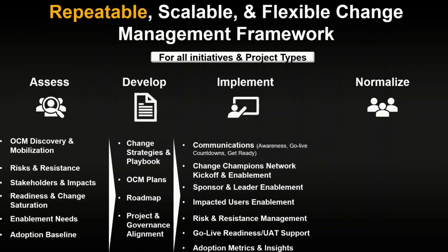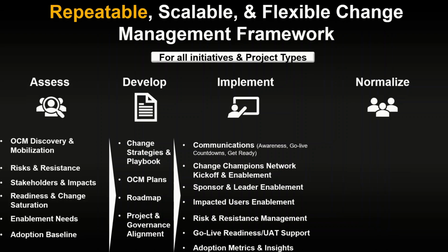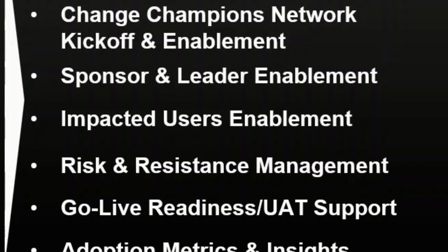So ongoing monitoring is important to manage risk and also resistance. And then you want to ensure that you implement go live readiness and providing any UAT support. This ensures the organization is ready and that you are gathering feedback during any testing. Not every project will involve UAT support.